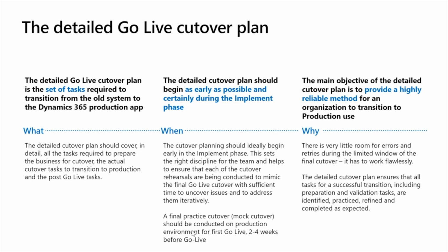And when should you start it? As early as possible. In the early days, of course, it's just going to be a skeleton. It's going to be a shell with some placeholders. But as you go through the implement phase, you should be filling this out into more and more detail. And it should be ready by the time you are going to be doing user acceptance testing.